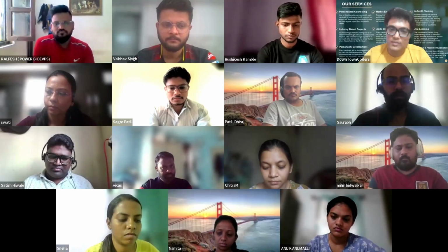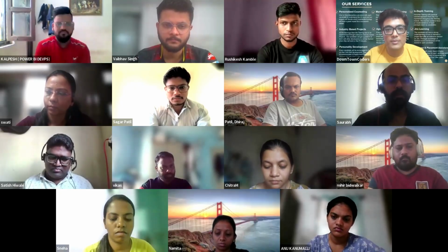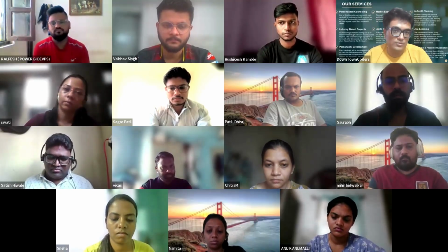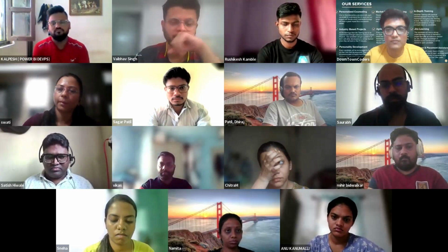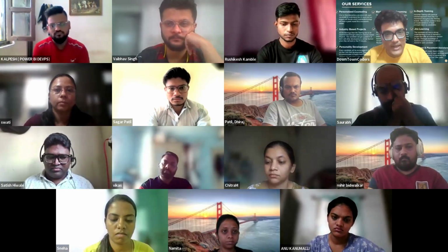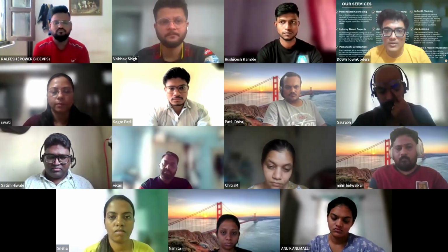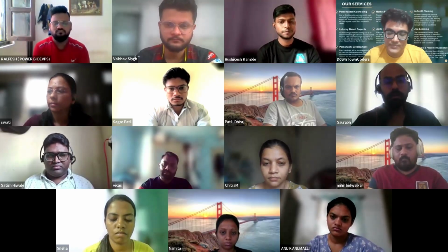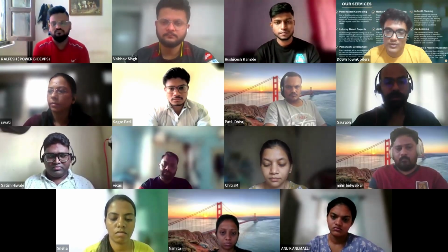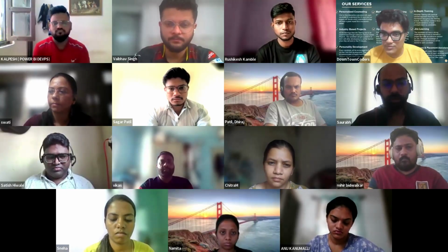Suppose one story point means 8 hours of work. In a day, you work 8 hours for an organization. That's the government norm. If you're extending, you're extending. So 8 hours is considered one story point, for example. So one story point is equivalent to 8 hours.